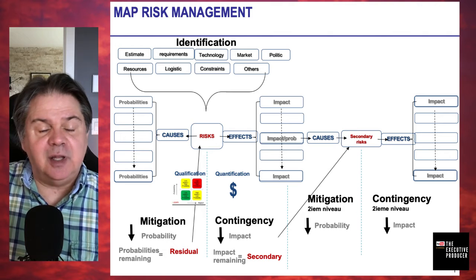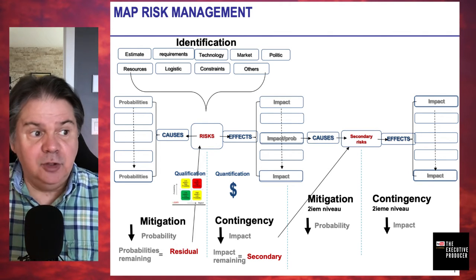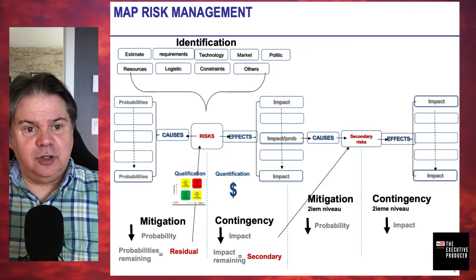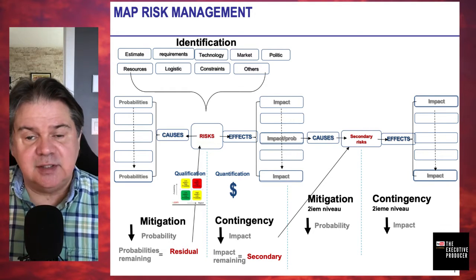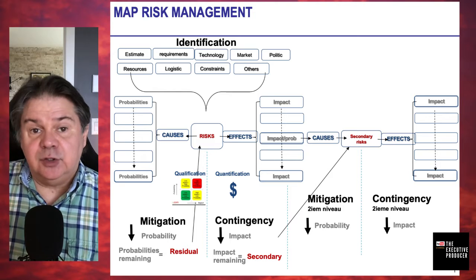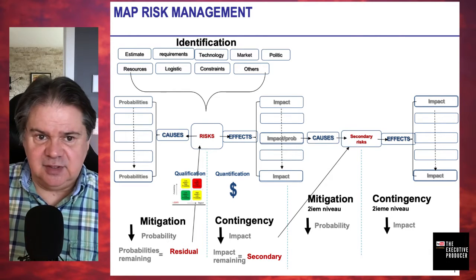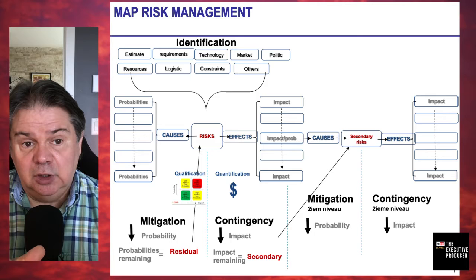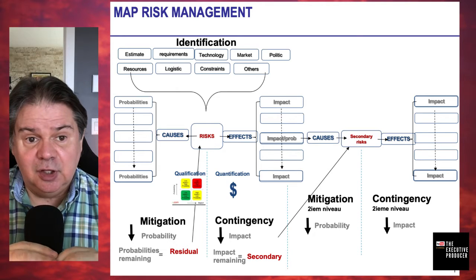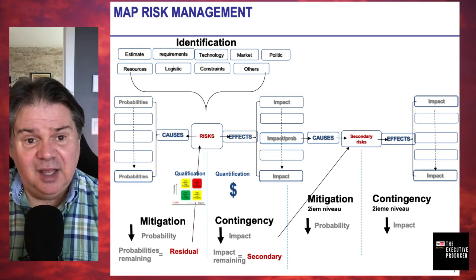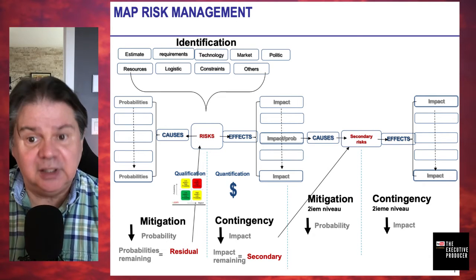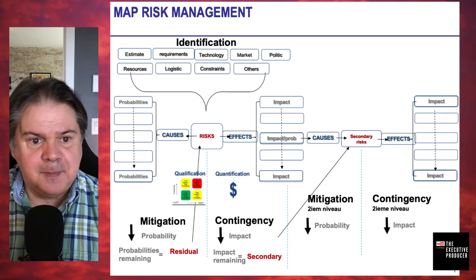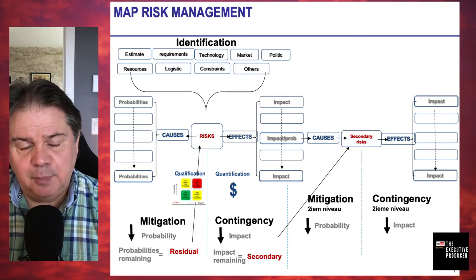For example, let's say you do an outdoor summer event — a stakeholder might ask what happens if it rains. If you haven't considered that, your confidence drops fast. But it doesn't mean that because you identify a risk you will necessarily deal with it. In certain cases you're going to decide: we know it's there, we'll accept it, and if it happens and turns into an issue we'll deal with it. That's also a valid game plan.